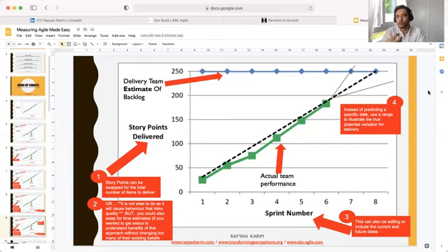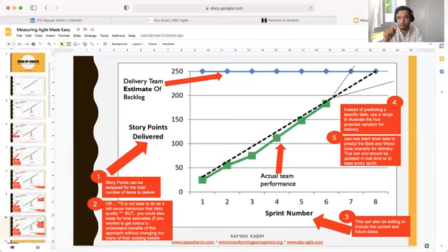That way you give a full story to your stakeholders, right? That accepts the variation of the team and accepts the complexity that they're working through, and also accepts that we don't know the answer yet. We're working hard as a team of people to deliver quality software at pace, if it is software that you're creating. And this tells the true story. So in my opinion, you want to use the real team's data for this, and you want to make sure that your stakeholders understand best possible case, worst possible case, and the most optimum case from when we started without taking our data into play. So I would personally show all these three angles and tell the full story.